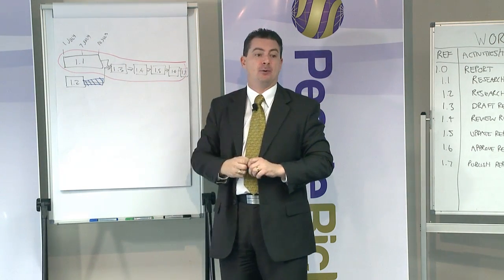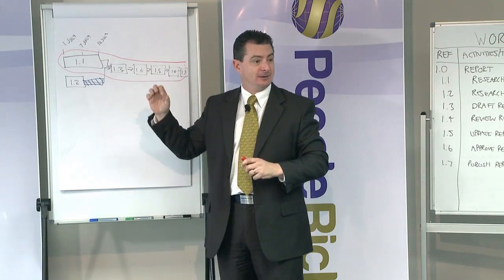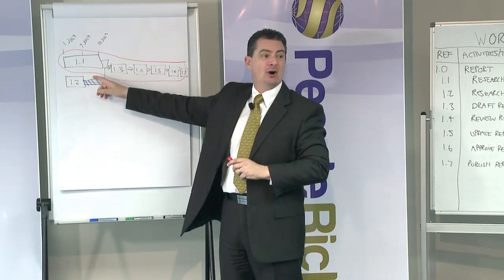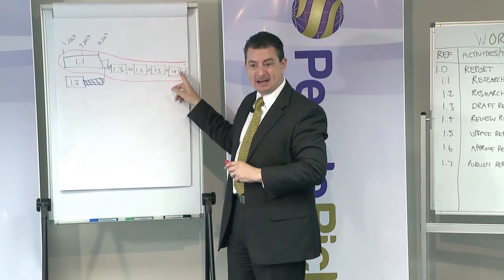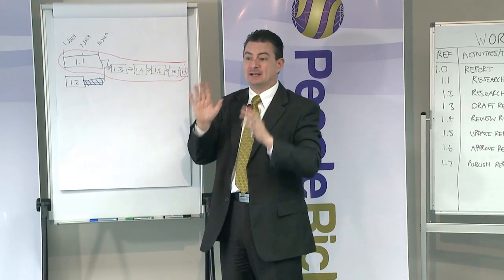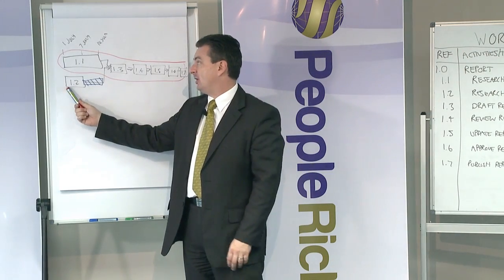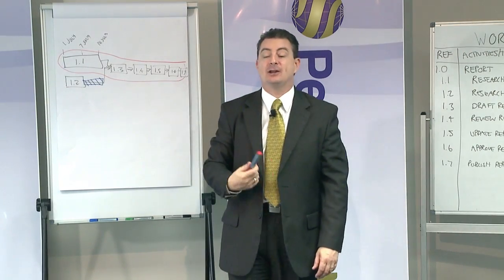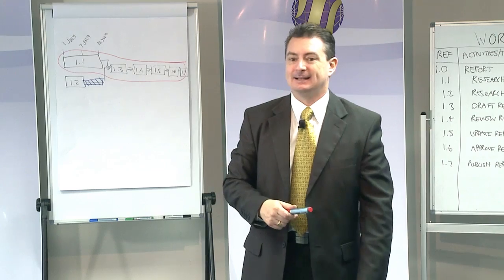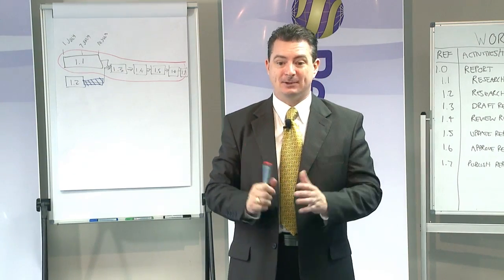But if you're ever brought in and there's a project that's late, you ideally want to look at the critical path ones, because the critical path tells us where we need to focus. Now, you could have started this on the 1st of July, you could have started on the 7th of July. When else could you have started it? 2nd, 3rd, 4th, anywhere between.